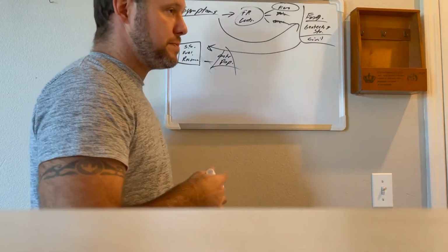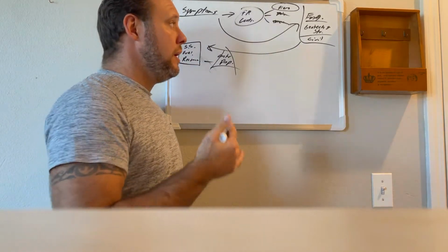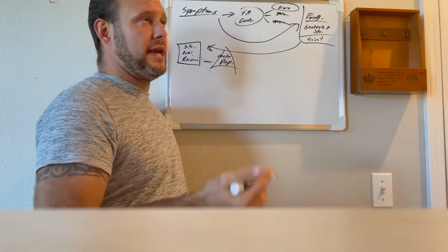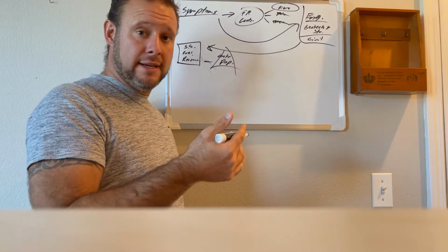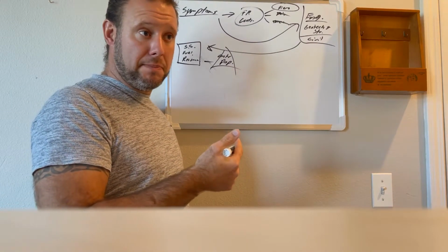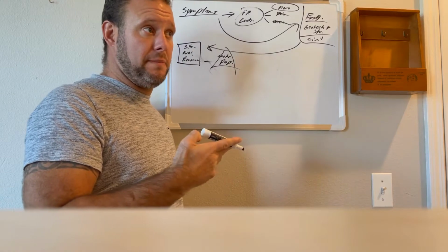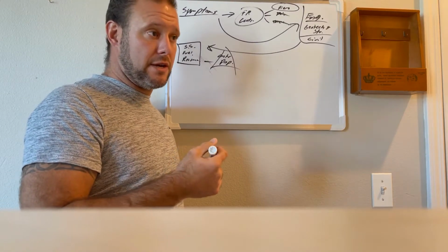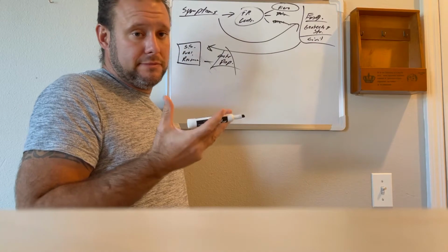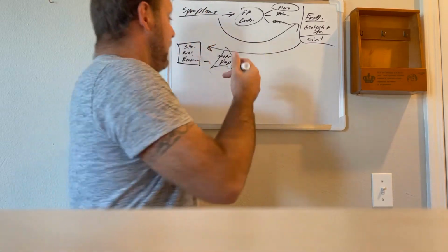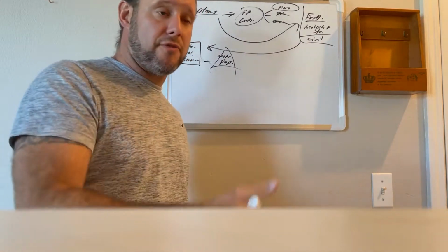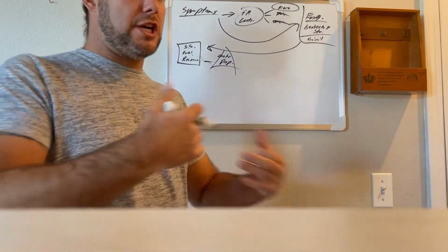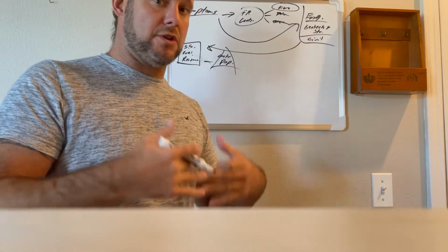After the contractor gives you his proposals, you select a contractor. He will provide his spec sheets over to the engineer. They're going to talk and make sure that everything is copacetic. If the engineer does not like ECP piers and the contractor uses ECP piers, then you're probably not going to be able to use that contractor. Anyway, if the contractor says, hey, ECP is rocking awesome, here's our information, the engineer says, great. He changes the plans. It reflects ECP piers. Great.